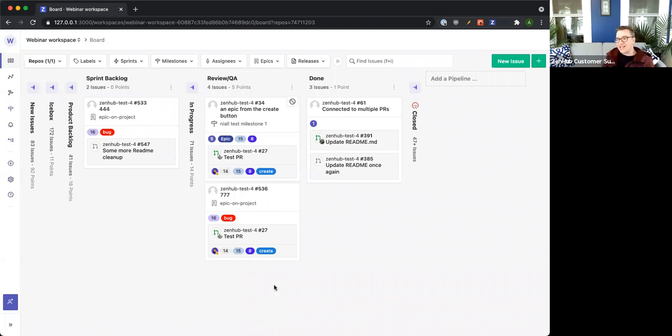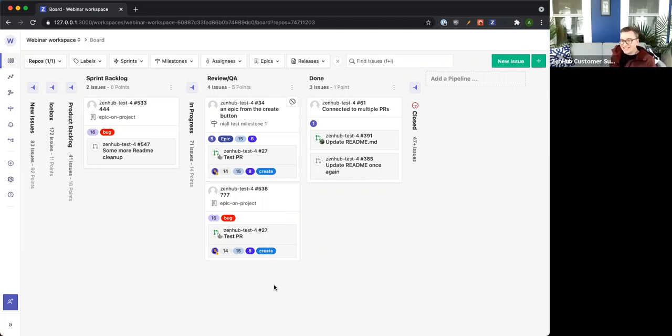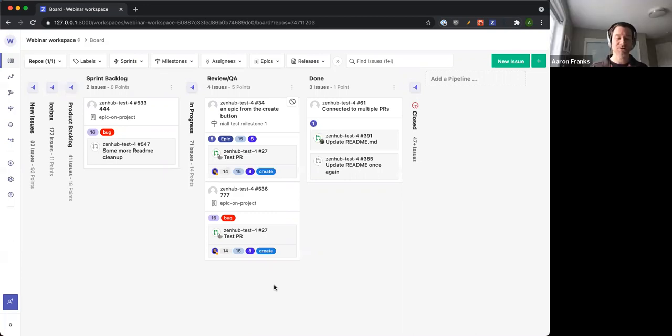No, how much time have you saved doing this? Yeah, so it depends on how many issues we'd have to estimate and how long a refinements meeting would be. Historically, I think we had a 1-hour meeting every week. And now I would say that's down to maybe a 15-minute call every 2 weeks, just for the issues that need attention. So you multiply that by the number of people on the team, and it's a pretty significant time savings. So it's helped us ship a lot more work, I would say.